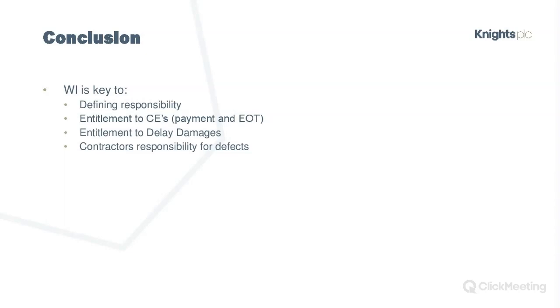Point out that if clauses like clause 12 are removed, and they want the contractor to be responsible for all ground conditions and take that risk, then there is a price for that, because who knows what will be found on site. That's one of the big unknowns in construction.